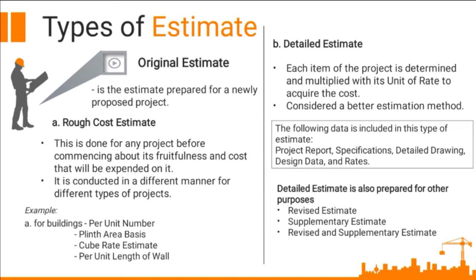Detailed estimate is also prepared for other purposes. Number 1, the revised estimate: it is prepared if changes are made in the project design of the already prepared estimate, or if there are changes due to fluctuation of prices. It is accompanied with comparative statements that clarify the price fluctuation in each item. Number 2, the supplementary estimate: if construction is started and changes in design are felt, and expenditure cannot be covered with approved funds, then an additional estimate is prepared, which is called a supplementary estimate.